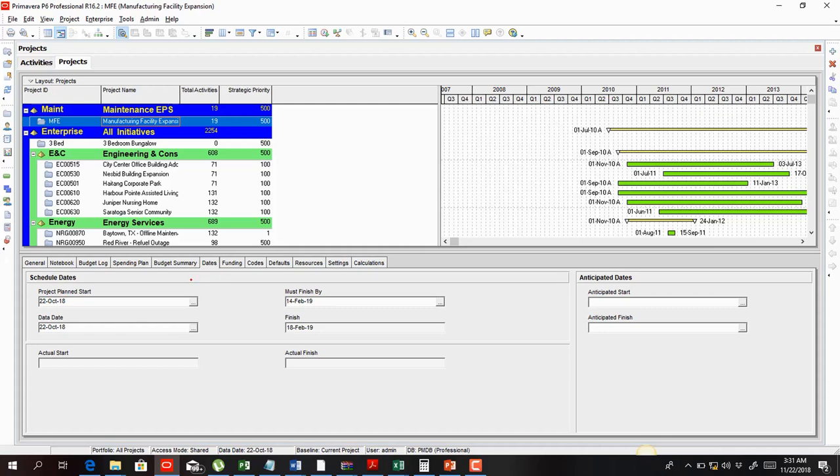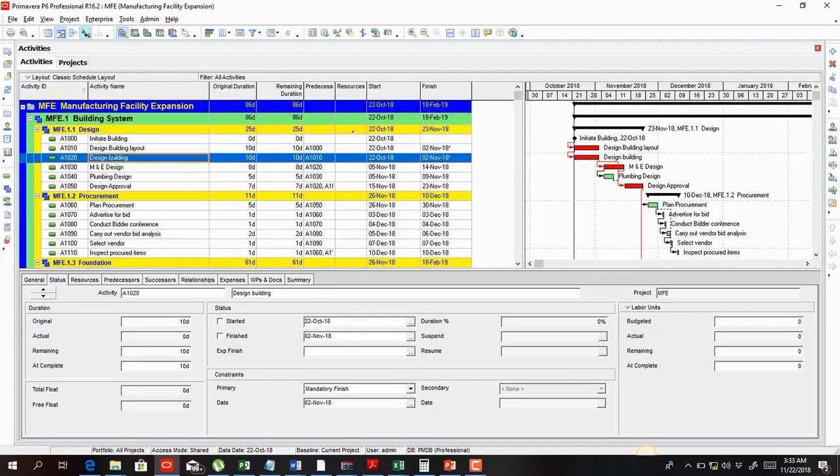So changing some of these durations is going to affect certain things in your P6, and may also affect some of the project activities on the critical path, and may even result in what we now refer to as negative float. So if I navigate back to my activities page, let me add my float column so that you can see what we're talking about.